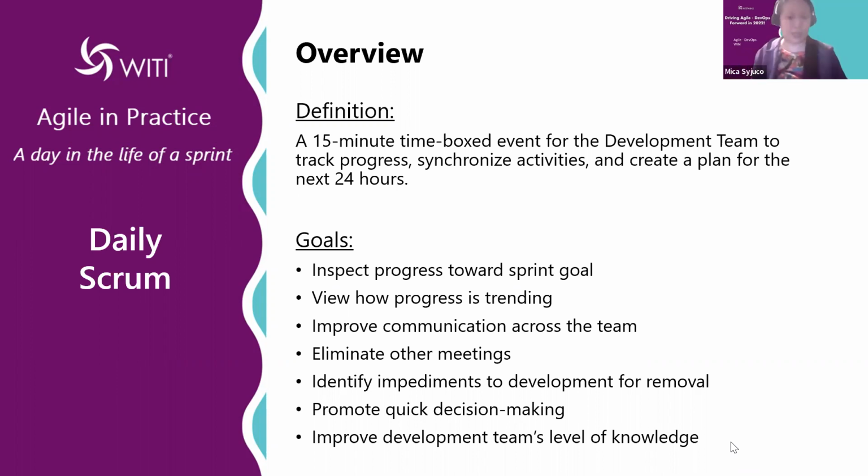And what does it really mean, right? It's 15 minutes, it's time boxed. It should just be 15 minutes as much as possible. You're keeping it in that time box, right? And the developers, right, talk about, this is our progress. We're synchronizing our activities, right? Really trying to make sure that we're on the same page. And we're replanning too. Like, hey, if our plan for today and for tomorrow doesn't make sense anymore based on the reality of yesterday, then we have to adjust, right? It's about real-time adjustment, inspecting and adapting.